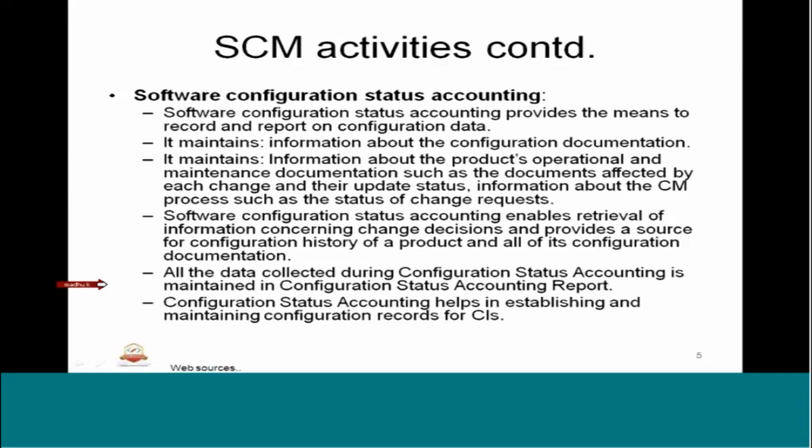Okay, all this will be part of the project. The project will have this information in terms of the configuration identification done on the different artifacts, how it is controlled, who is maintaining it, where the documentation is, and the status of each of these items will be part of the accounting. This itself is an activity. So at a set frequency they will generate this report, and that report will go into the next stage of the SCM activities, which is called audit.